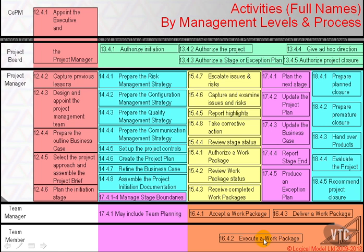As mentioned in the previous video, that expression was a little naive — we will come back and discuss this in greater detail. Quite commonly, team plans are created when performing stage planning. That's illustrated here: when we do stage planning, it may well be that team planning, which is part of plan the next stage, occurs at that point in time, being conducted by team managers supported by team members.